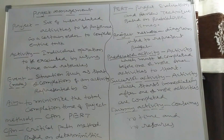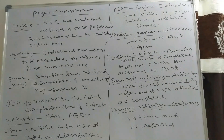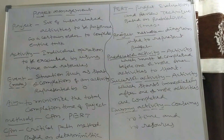For example, the activities in a building construction project are: plan approval, site preparation, transportation of raw materials, construction of foundation, construction of pillars, construction of walls, plastering, wiring, plumbing, and finally, colouring. These are the activities involved in that project.